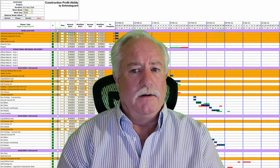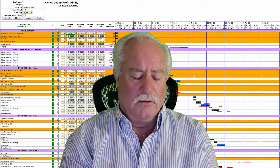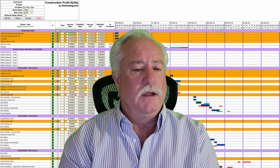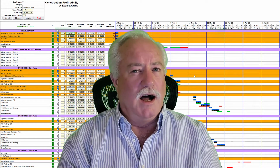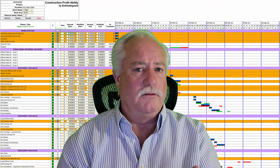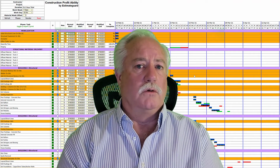The next thing that'll happen, or should happen, will be to assign start dates to each one of these tasks. And that's generally going to be determined, if you're a subcontractor, by the general or prime contractor's baseline schedule, probably the same schedule that's in your contract that you agreed to follow. There should be slots in there for you to complete your work. So you're just going to build your master schedule off of the time slots allotted to you in the baseline schedule. And once that's done, then you're ready to start your work.